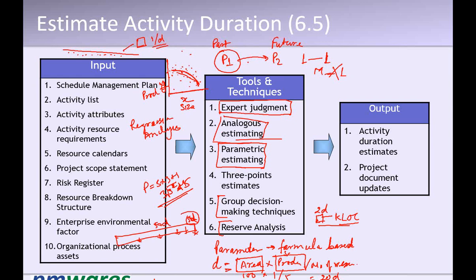So this reserve analysis normally says, looking at the risk factor on the project, you can assess how much buffer you should have on this project, and then manage the buffer, continuously looking at how much buffer we have consumed and how much is left over. This is reserve analysis. We do the reserve analysis in our costing part also. We will look into that in the next chapter.